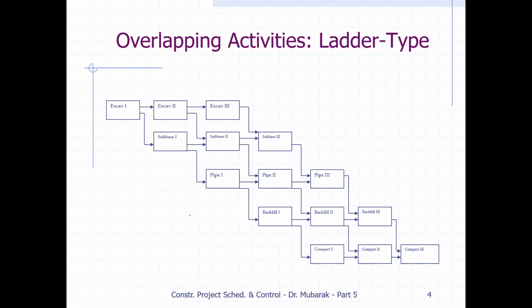However, this approach is mostly utilized for horizontal construction, not vertical. Vertical construction is more complicated and requires a lot of activities. In horizontal construction it is easy to use because typically the activities are few, but those activities take longer. In vertical construction, each activity could take longer, and at the same time, you have a lot of activities.